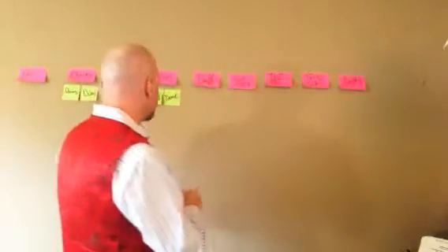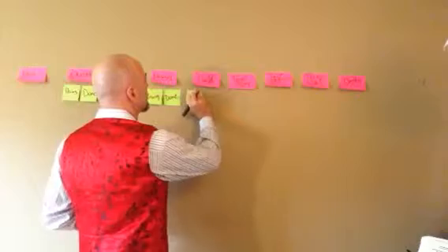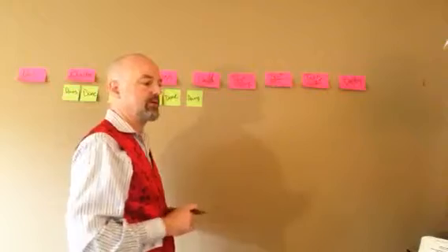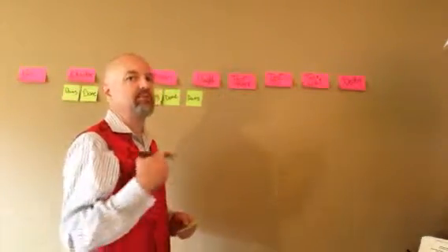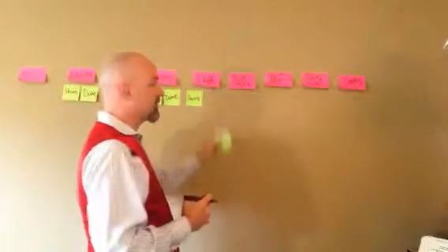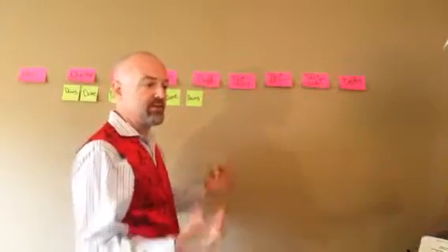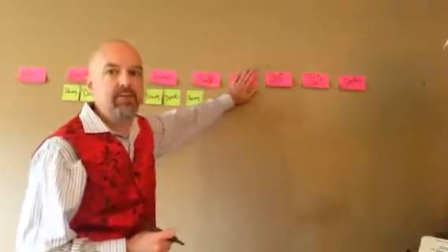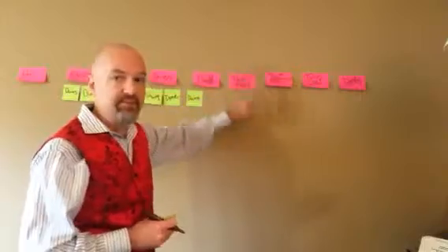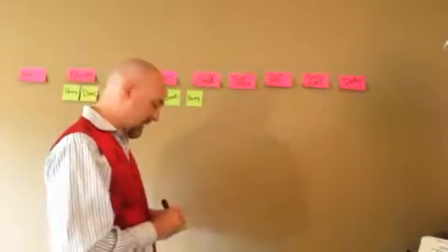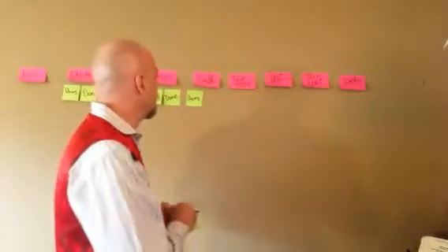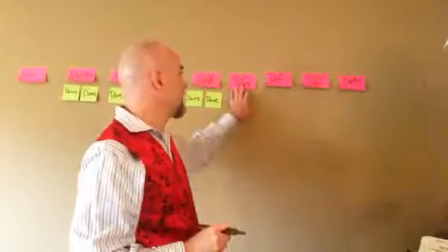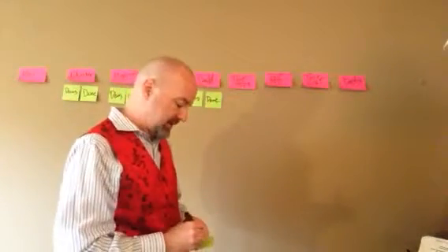The great thing about doing this kind of workflow visualization is it helps you see where your bottlenecks are, and where you're doing too much batch processing. There's not enough people, potentially, in one of the areas, and so you end up with a bottleneck there, or there's not enough resource, and I'm talking honestly about the word resource, not about people, right? A test environment that's clobbered up with too many people. Maybe there's a lack of a skill set, so that even though there are enough people, there's not enough skill set within that area.